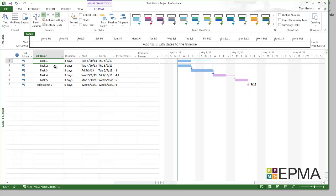If I click on task 2, the highlighting will be updated. And I can see which tasks are the successor tasks to task 2. In this case it's 3, 4 and 5. Now perhaps I want to see which tasks are driven successors.